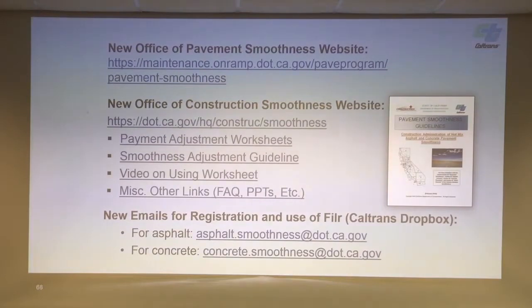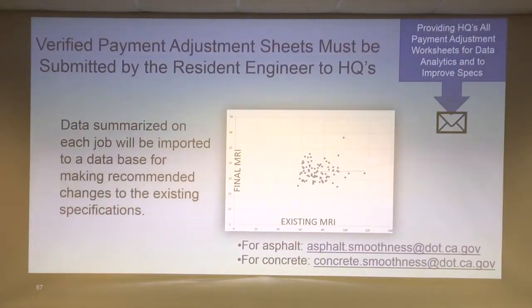Just a quick question on that. How are you differentiating between the existing and final? So, I basically took a table, and I had all the existing MRI values beforehand. I got all the profiles lined up. So if I looked at this dot right here, that's a 1/10 mile segment. I would have had an existing MRI value of, say, 58 right there.